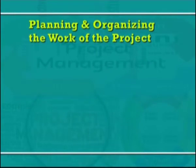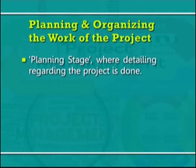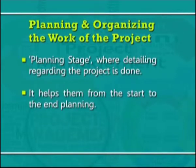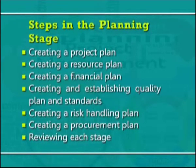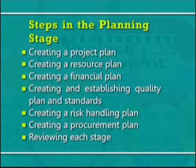Planning and organizing the work of the project — this stage is also known as the planning stage, where detailing regarding the project is done. It helps from the start to end planning. The steps involved in the planning stage are: creating a project plan, creating a resource plan, creating a financial plan, creating and establishing a quality plan and standards, creating a risk handling plan, creating a procurement plan, and last but not the least, reviewing each stage.